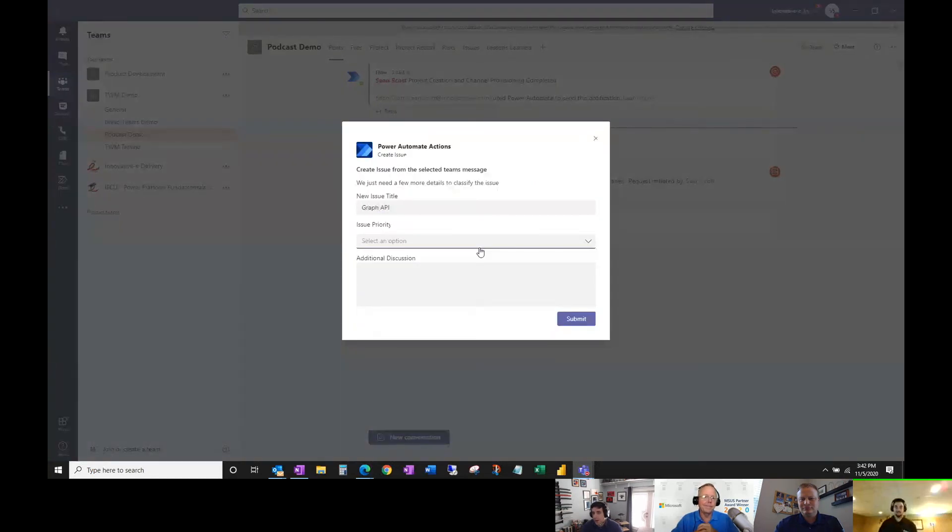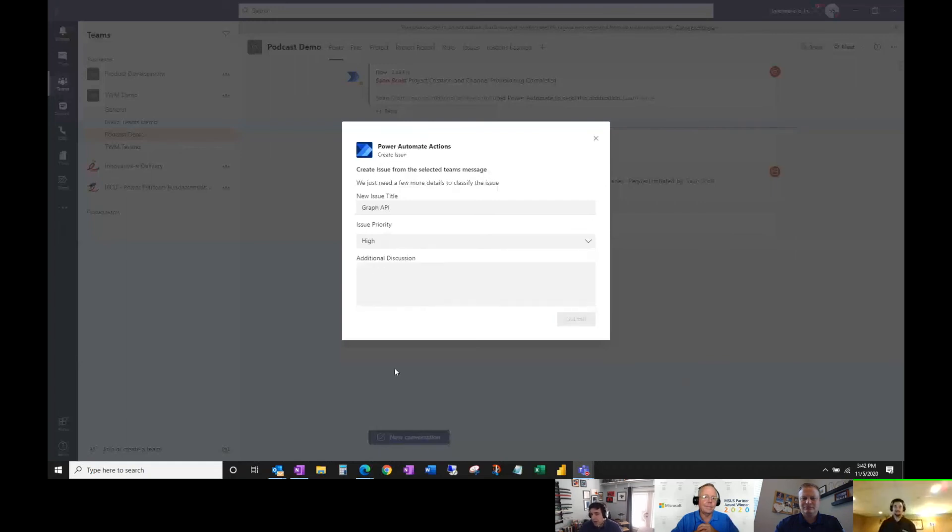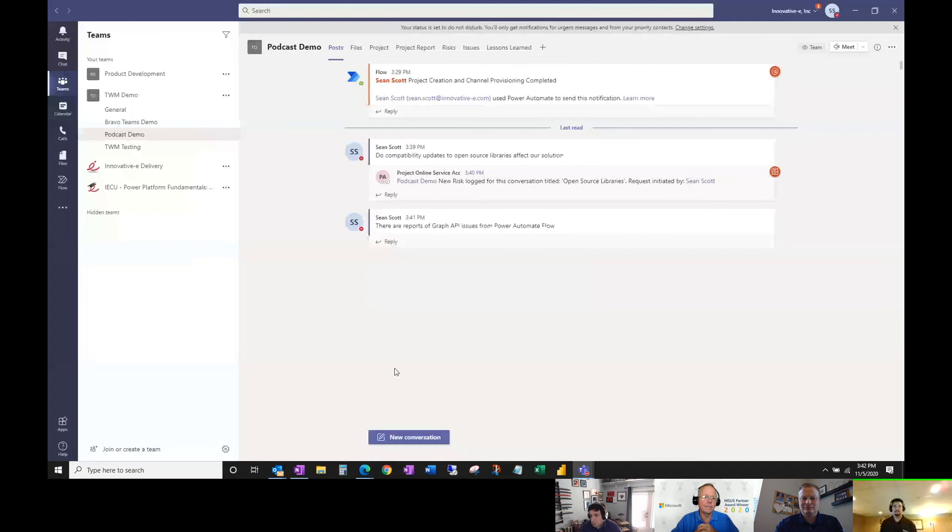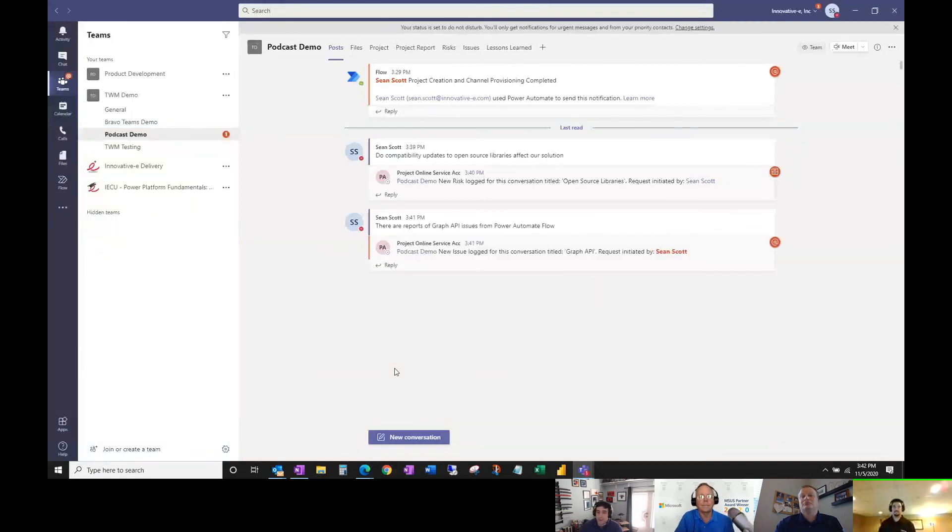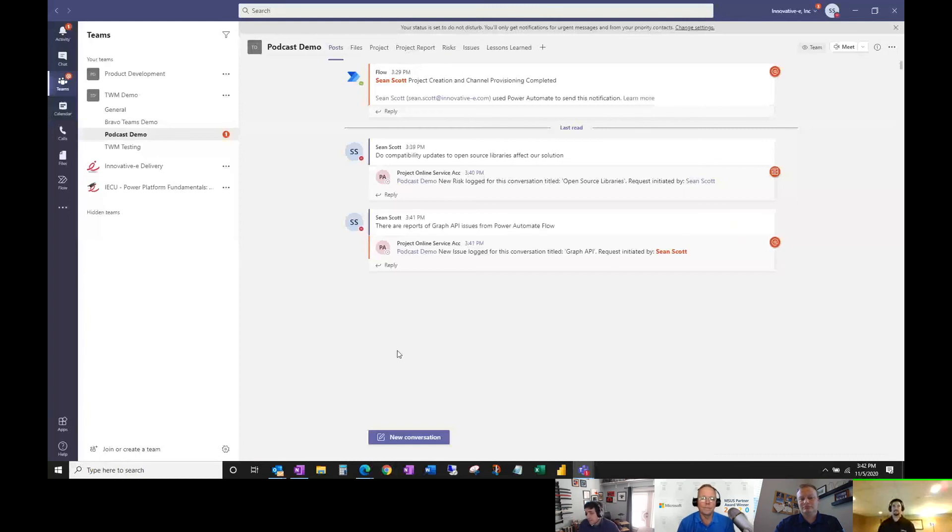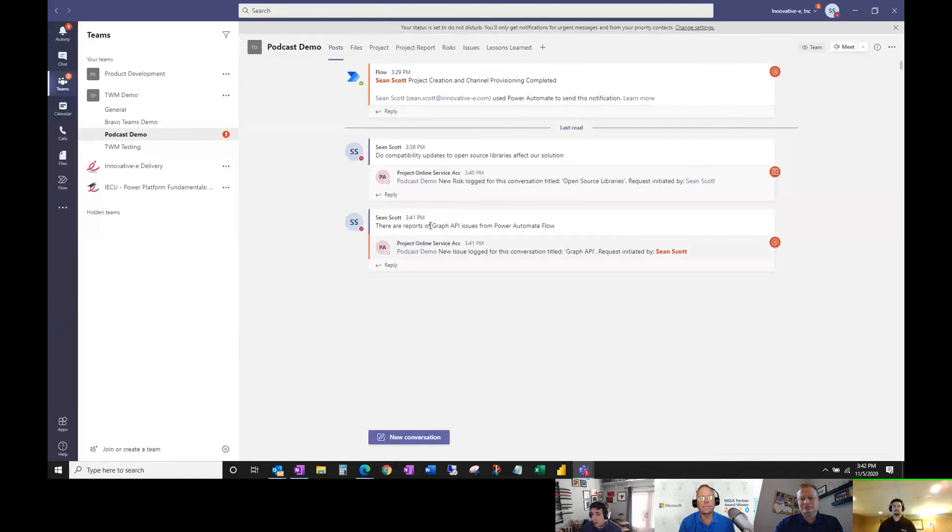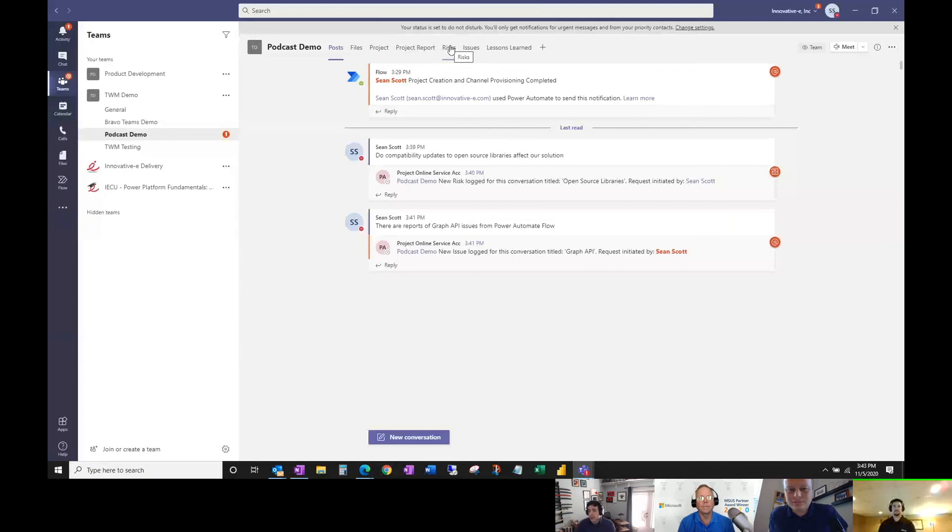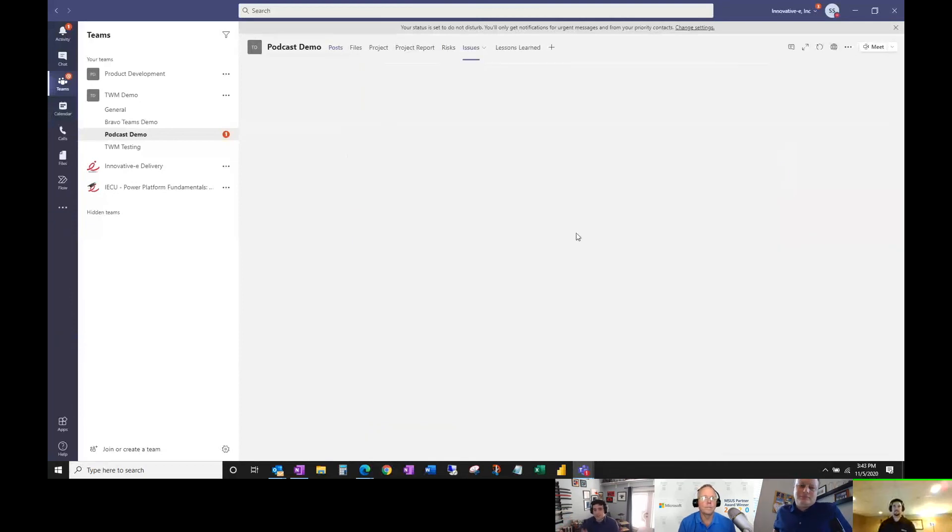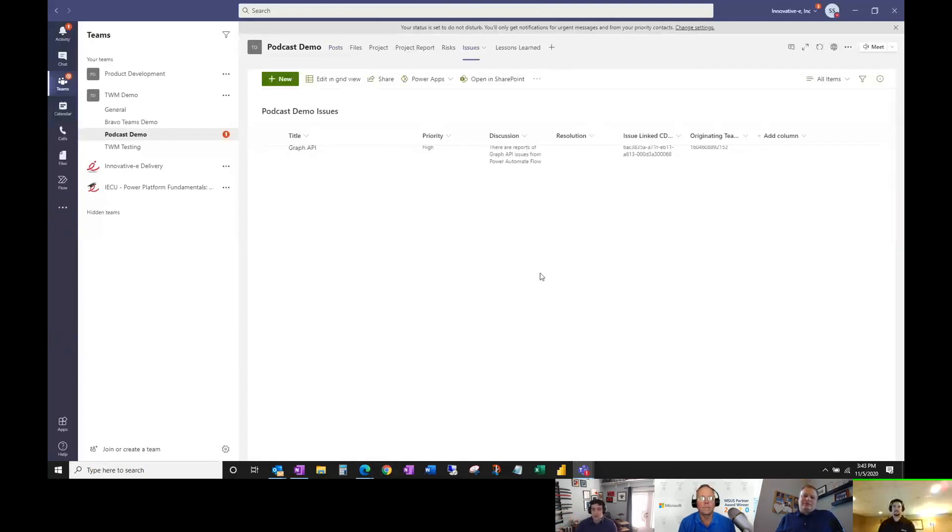The power of this is, let's say I'm a project manager and Brian and Sean are discussing something. Maybe they don't realize it's important or think it's a risk or issue, so they're not logging it. That's fine, but they're having a discussion. As a PM, I'm going to think 'that seems important' and put it up there. I don't have to lose track of it, go to different screens, copy and paste—I just add it. That's really powerful stuff.